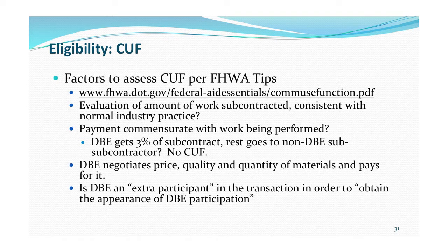And there's many factors that you need to look at when evaluating CUF. Here's a cite to the DOT spec that allows you to read it in greater detail. But you have to evaluate the work and determine whether it's consistent with normal industry practice. Obviously, if you give your work to a CUF, he performs 3% of it, subcontracts the rest of the work to a non-DBE subcontractor that has no CUF, there's no commercially useful value being provided by that subcontract.